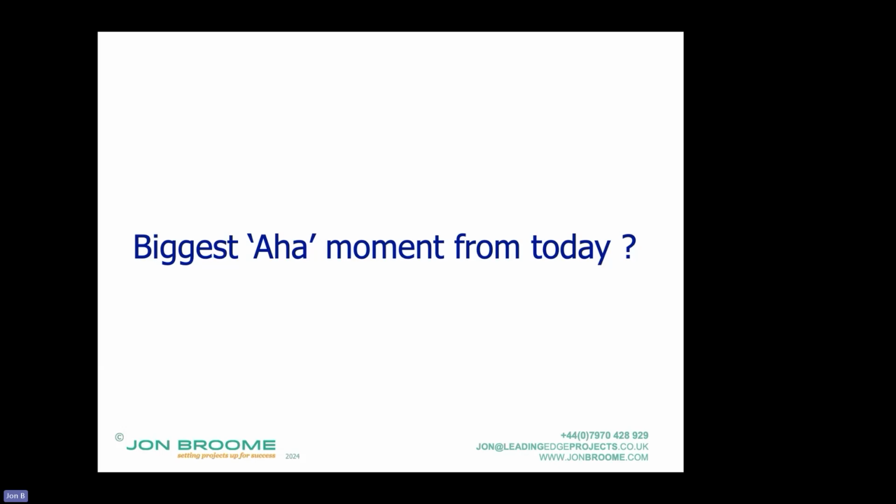One of the things they did in the latest version, version D of the ECC, was tighten up the words for if you didn't go to stage 2 with that contractor: the reasons for terminating, not paying excessive amounts, and being able to get someone else in. That's in the contract, but otherwise you'd have to write words around it. So yes, you do have to comply for both stages. It's one procurement.